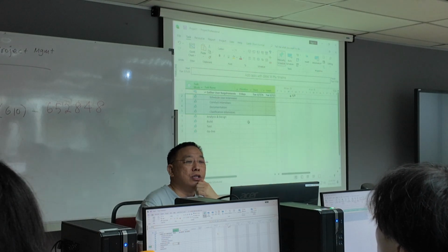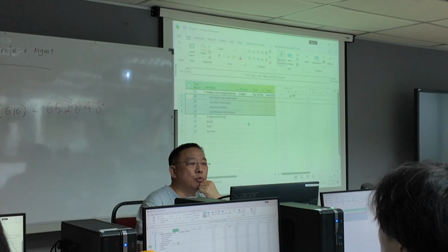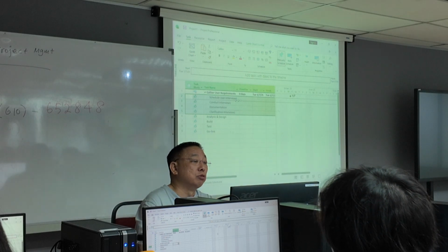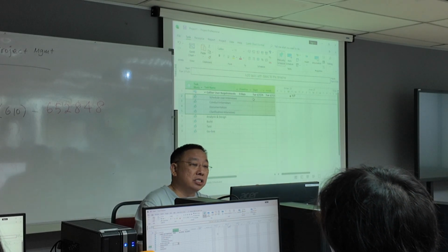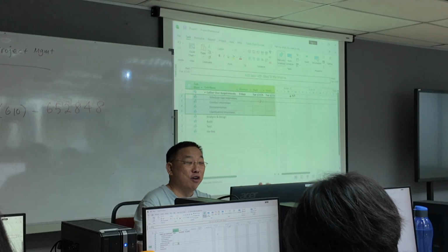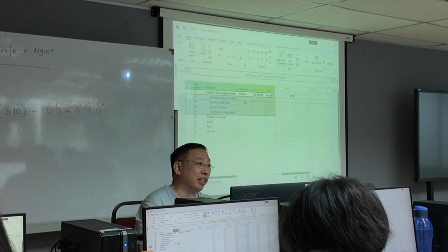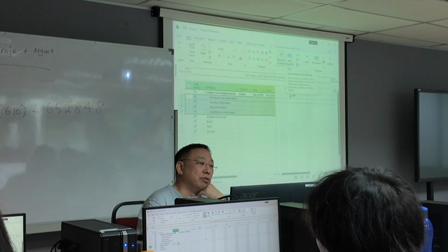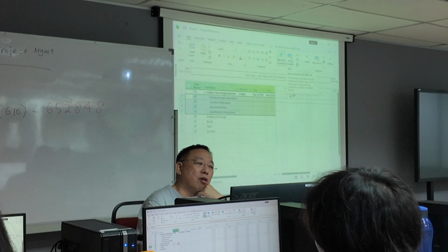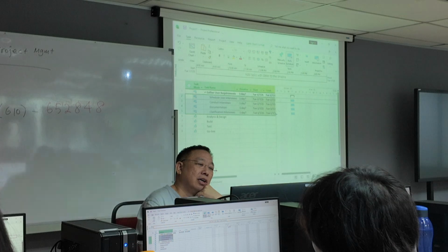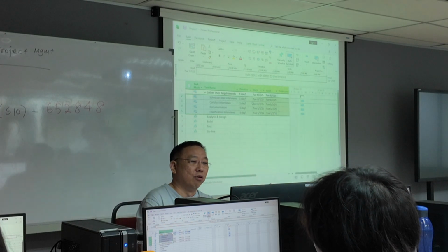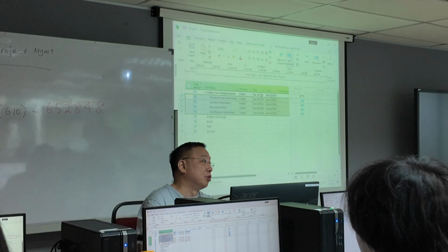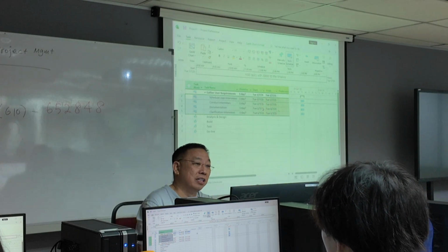Now the next thing you want to do is you want to put in the duration. How long will it take to schedule user interviews? When do I start? When do I finish? But if you have many subtasks, it's going to take a lot of work to fill it out, right? So thankfully, Microsoft Project has a feature called Auto Schedule. So you select that, and you click Auto Schedule, and automatically it fills up by default 1 day. And you notice it starts all on 1st July because that's when we said the project will start, right? So by default, it does that.